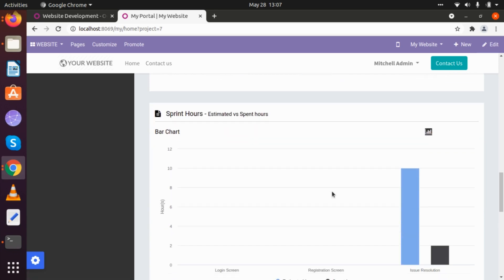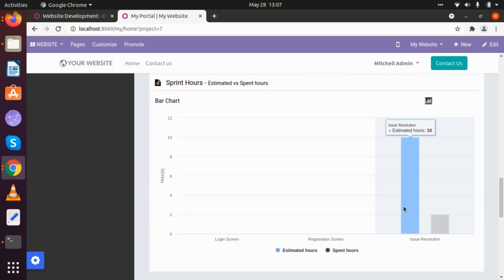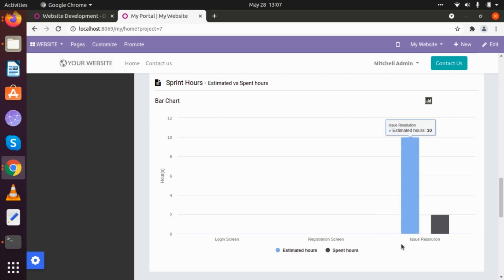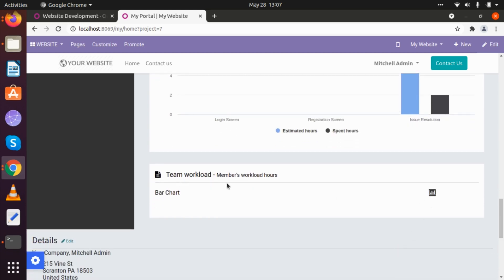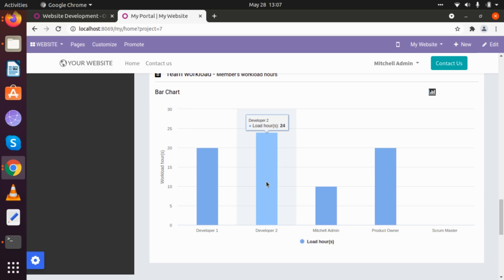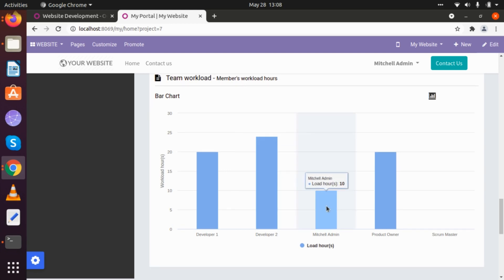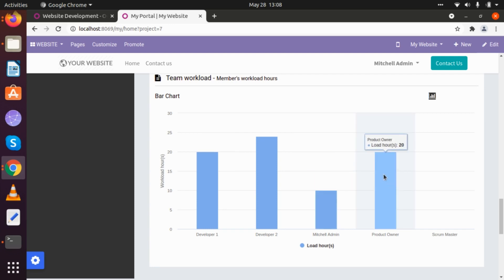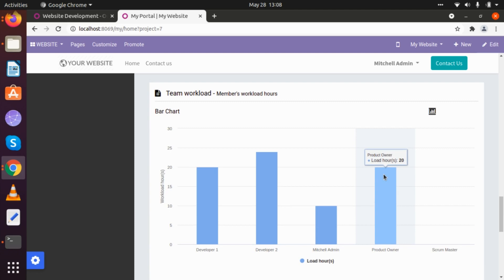Here we can also check estimated and spent hours on our sprint. We have added data in our Issue Resolution Sprint — in that sprint, estimated hours were 10 and currently two hours are spent. We can directly talk to our developer and ask them about data-related issues. Then there is team workload. If we want to look at team workload, we will be able to see: Developer One has a total of 20 hours of load, Developer Two has 24 hours, Mitchell Admin has 10 hours, and the Product Owner has 20 hours.